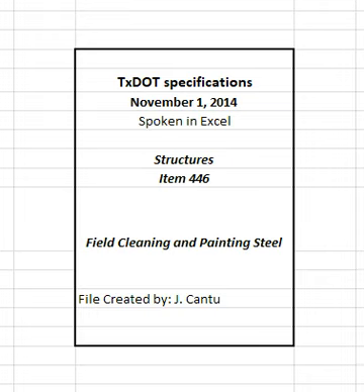The engineer may waive QP1 certification for minor, touch-up repair work and coating steel members repaired in accordance with Item 784, Steel Member Repair. The engineer may waive certification requirements, when stated on the plans, for the purpose of qualification in the SSPC QP program if the SSPC has accepted the project as a qualification project as part of the process for obtaining SSPC QP1 or QP2 Cat A certification.